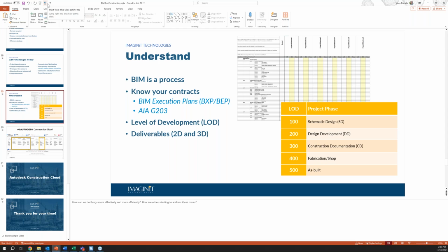So I suppose it comes to the project planning and making sure that you're very concise in the way that you've planned out those deliverables, and being more educated about the LOD matrix here and what those different LOD levels require. Reading through how they're defined in the contract document really serves as your legal grounding to back up who is responsible for what.